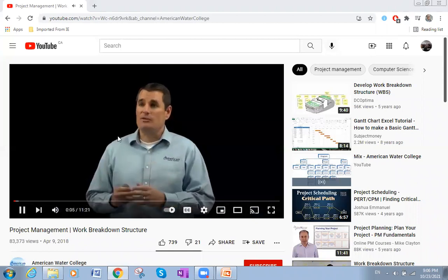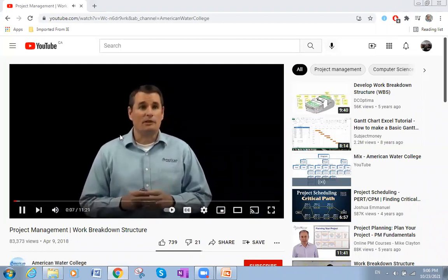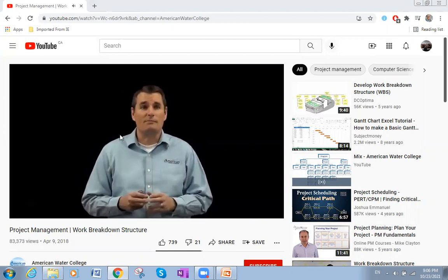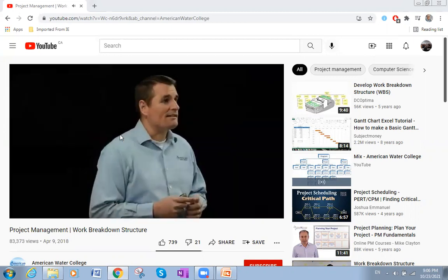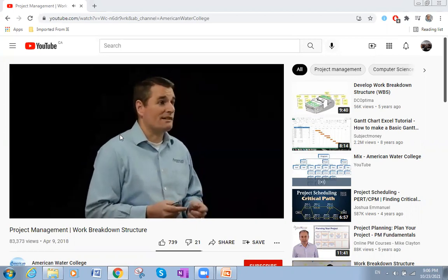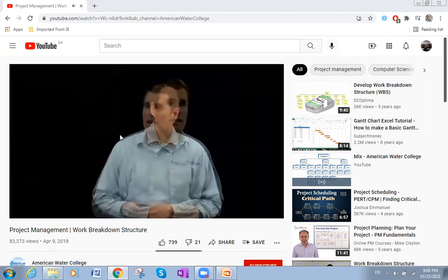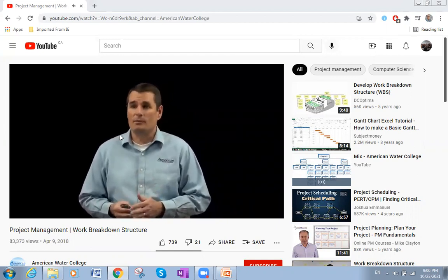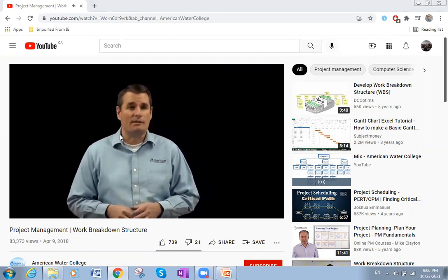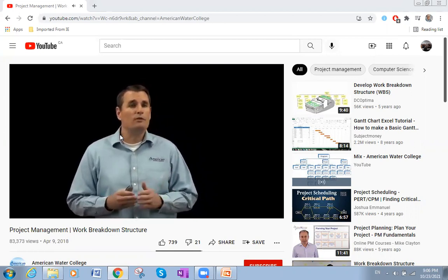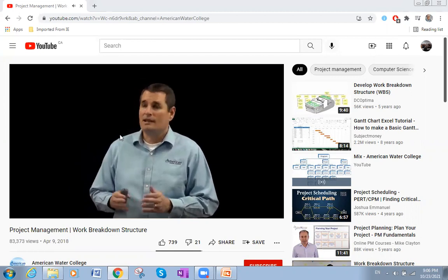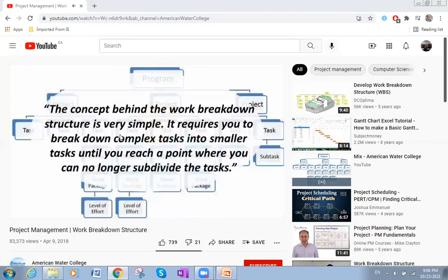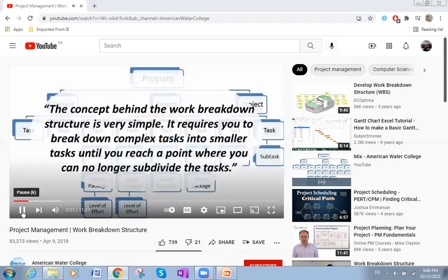Once the problem has been accurately defined and possible solutions have been discussed and then decided upon, and a project risk plan has been developed, an accurate estimate of the required resources and cost to complete the project is the next step. The leading cause of project failure is inaccurately estimating the time requirement and the cost involved with completing the project. A wonderful tool you can use to help with estimating is called the work breakdown structure. The concept behind the work breakdown structure is very simple. It requires...